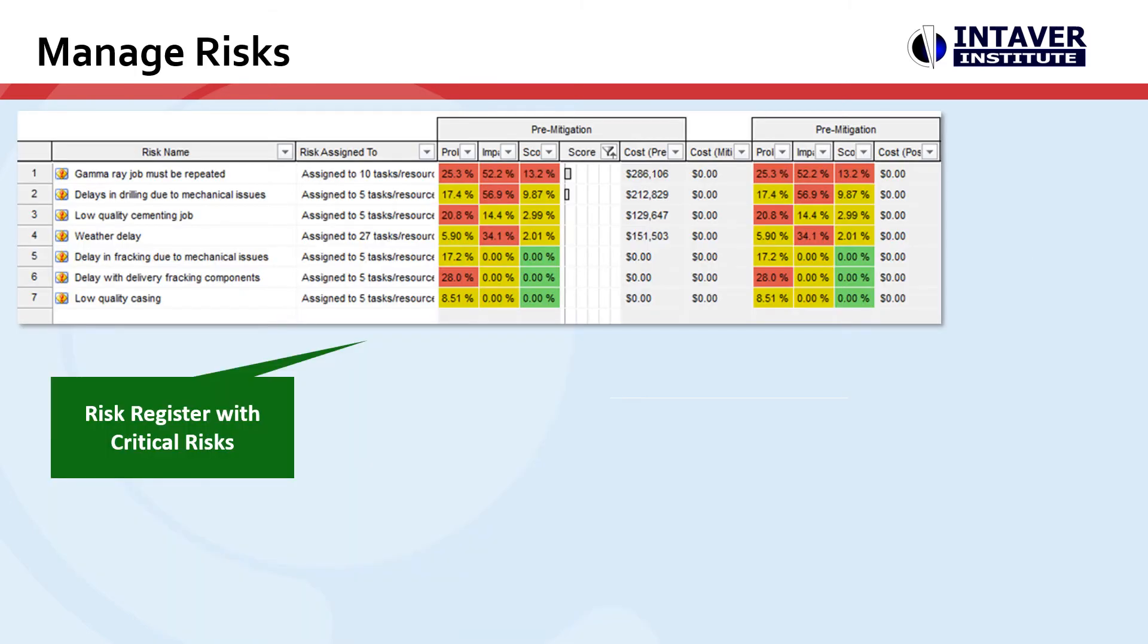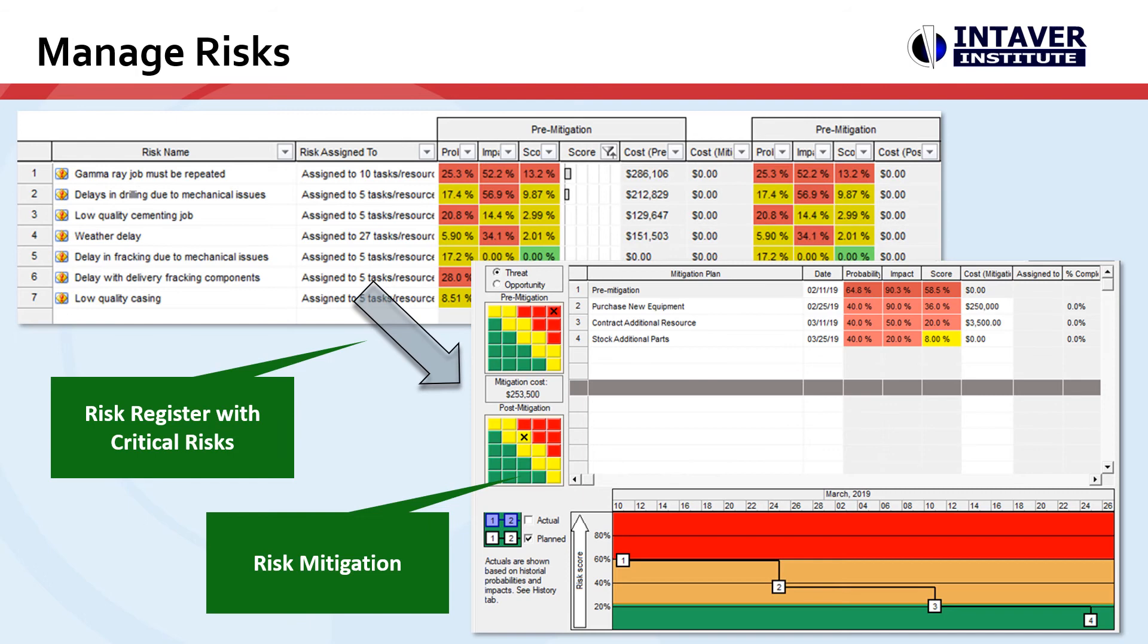Another output is the ranking of risks based on risk scores. We'll take those risks and manage them in various ways. One method is mitigation.